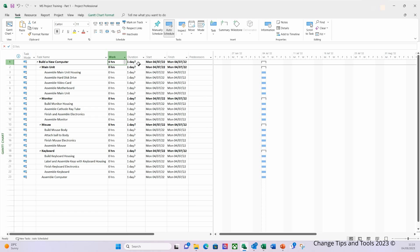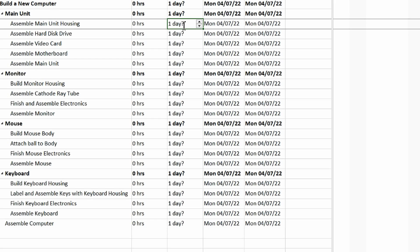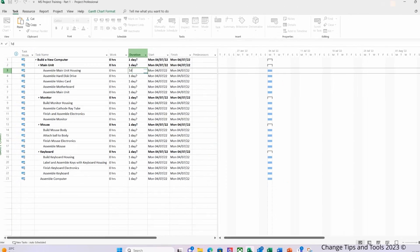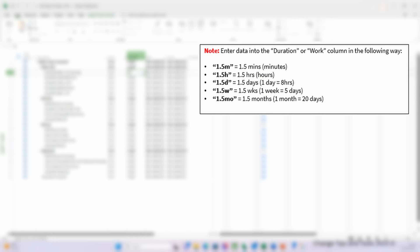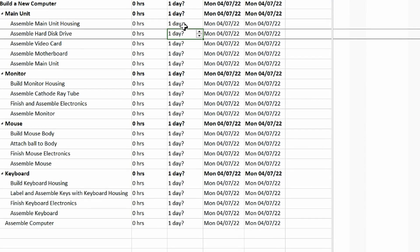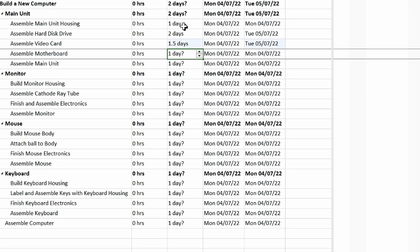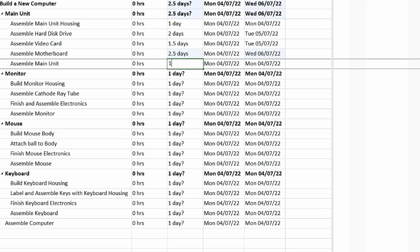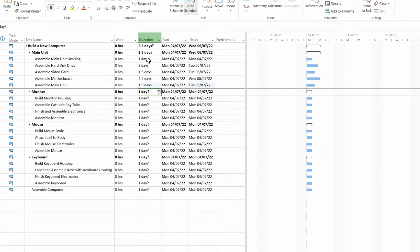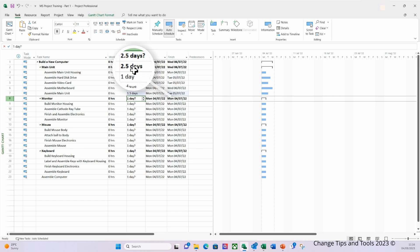I'm going to enter some duration based information here for the main unit tasks. I'm going to enter 1D. This is for one day, and if you look on the right you should be able to see a table that shows you how you would enter information for minutes, hours, days, weeks and months. So I'm going to press enter and then I'm going to enter the next 2D and return. So you can see now that there's no effort being shown here, but the main unit is now changed to 2.5 days duration.